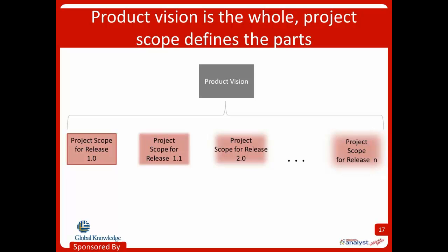But the point is, for the thing I'm working on now, that scope boundary needs to be very, very clear. And as I look forward, it's less clear. Okay? So what you can do in any of these approaches to your development methodology is build a roadmap for subsequent releases. Plan, knowing the scope statements are going to change over time, though. And know that those distant ones are going to be fuzzy. So just expect that kind of uncertainty as you look out into the future.